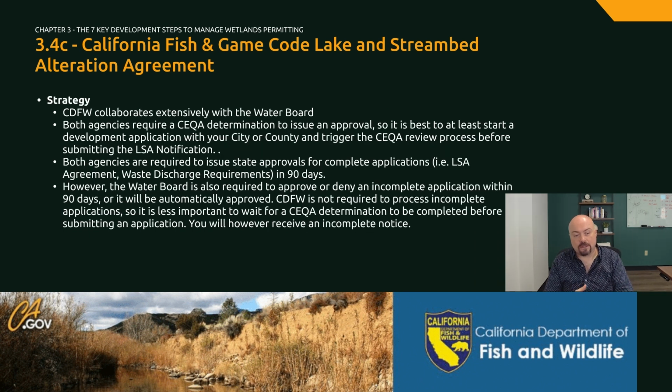As mentioned earlier, the CDFW collaborates extensively with the Water Board, so most likely you will be working with both agencies on your project. They both need a CEQA determination to issue an approval, so it is best to at least start a development application with your city or county and trigger the CEQA review process before submitting the LSA notification.